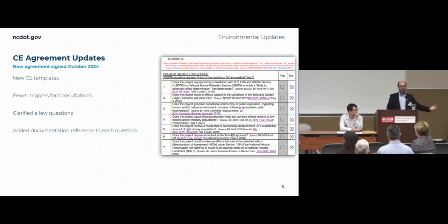You know, you were looking at this NRTR from 2018 when you did this CE in 2024. That's important for us to know, that way we know that 2018 NRTR is getting kind of old now. Maybe when we do a consultation, we need to make sure we've got good natural resources information that's been updated. So that's why that's there.